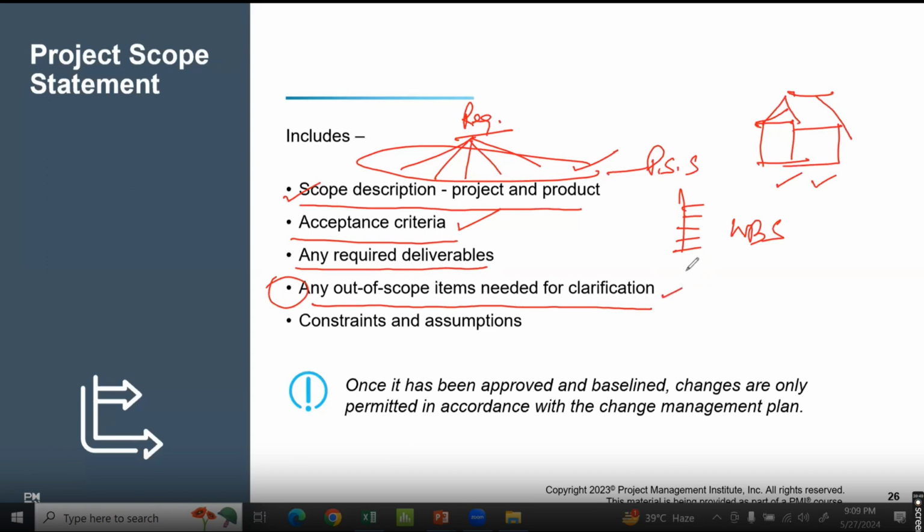Because when you do construction, you might require the government clearances, the environmental clearances, you might need municipality clearances, probably in certain cases, police clearances also. Bottom line, depending on what kind of job you're doing, there could be different clearances, and that's not my job. So the sponsor has to take it. That will also be covered in the scope: this is not what we will be doing. This is what the customer, the sponsor, will take care of.